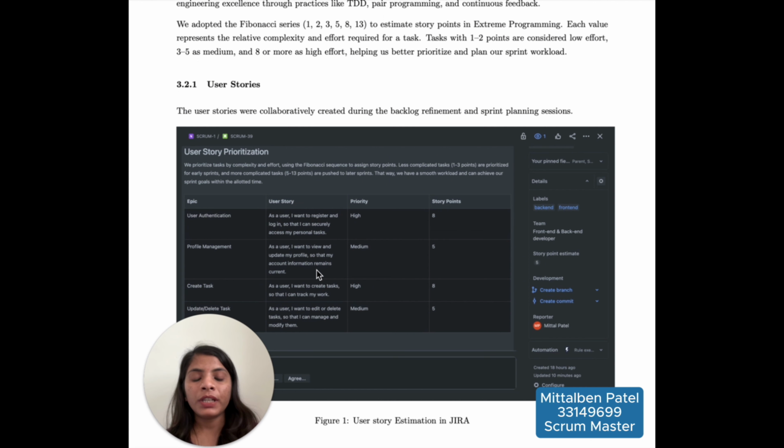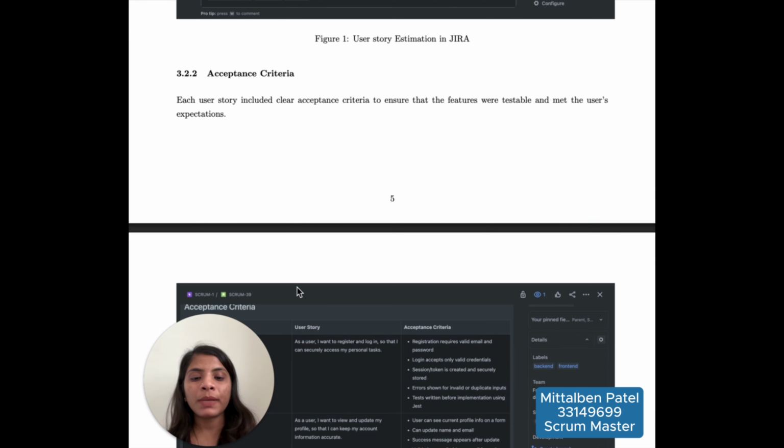As a team, we discussed and decided on the app functionalities and planned all the tasks together. I then organized the work into 3 sprints, each lasting 5 days, to manage the development process more effectively. My main job was to help the team stay organized, assign tasks, and make sure we stayed on track.